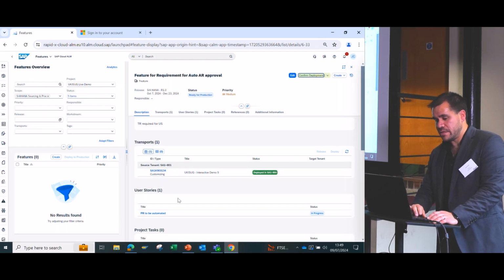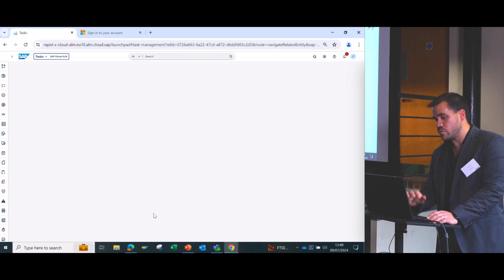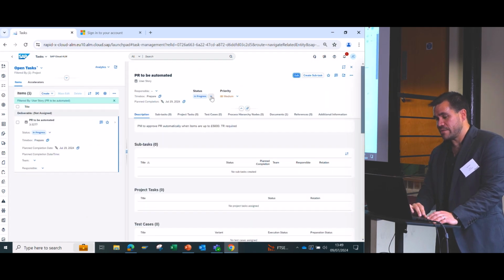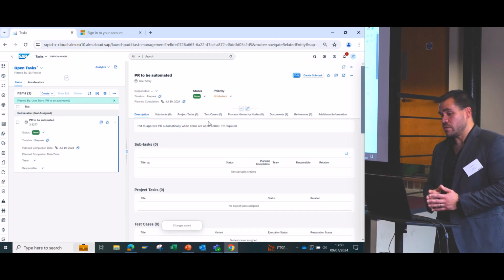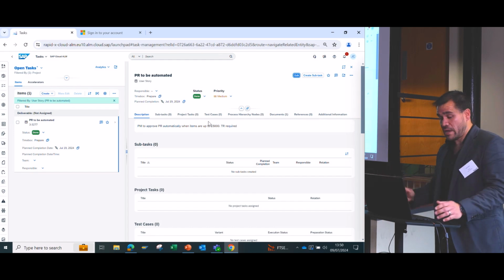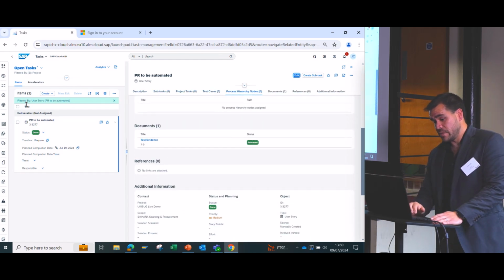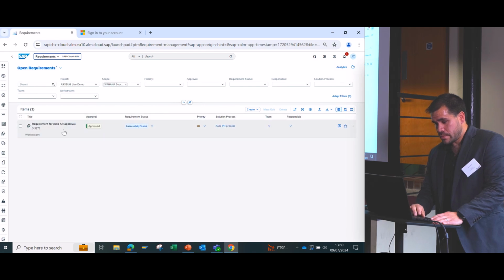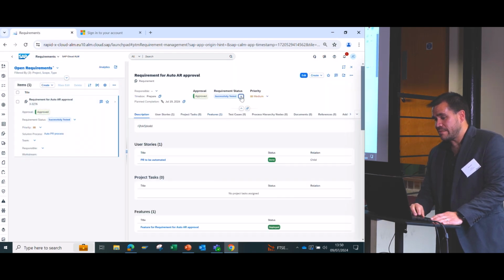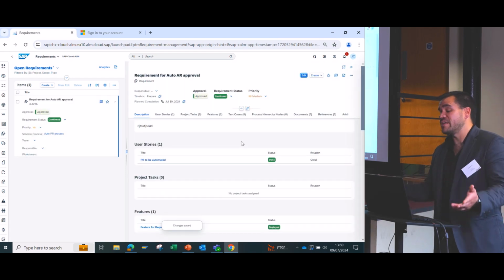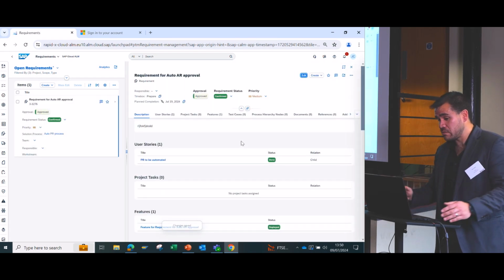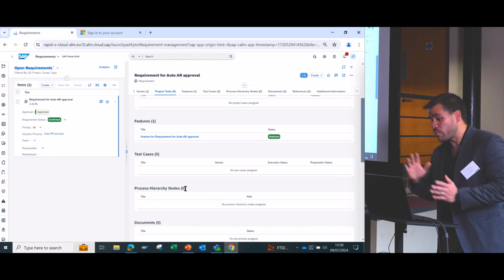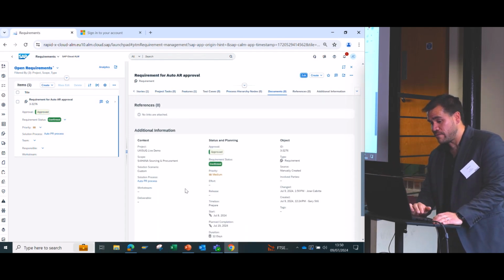So yeah, that has been updated. And the next activity for me is just to jump into the user story. And I'm gonna set also the status to done. Now it will be the case for the business, doing the validation after the go live, making sure that everything is working fine. So the business can go back to the requirements. And at this point, they can set the status to confirmed. They validate everything in production is working as expected.